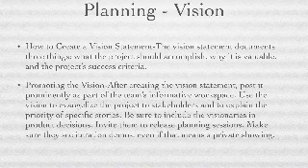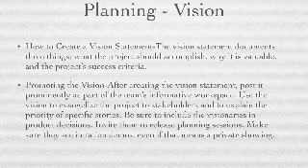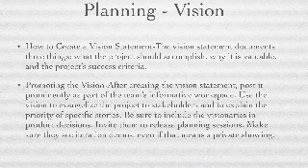How do we create a vision statement? A vision statement document must have three things: what the project should accomplish, why it is valuable, and the project's success criteria, what makes it successful. These three are very important points in the vision statement.